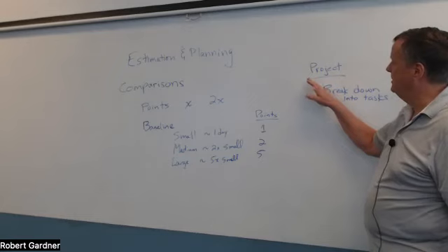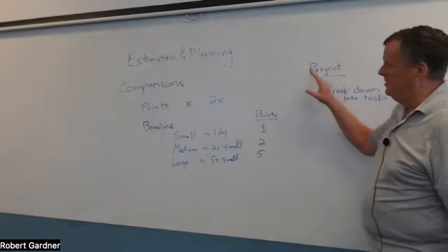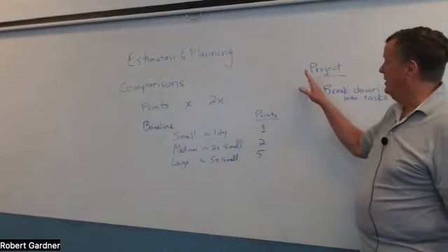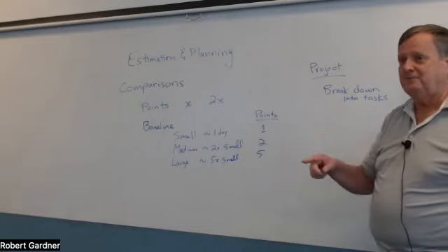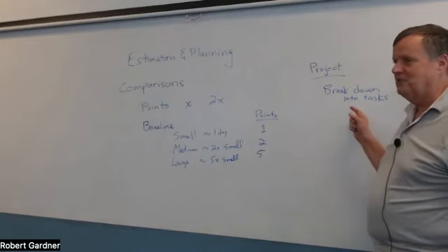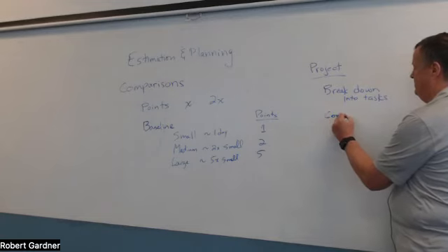But the stuff that you're thinking of doing, especially when you start your sprint, I make sure that the tasks that are being considered for the sprint, I go and break them down into these small tasks. Now I can compare those tasks to the baseline. Okay.